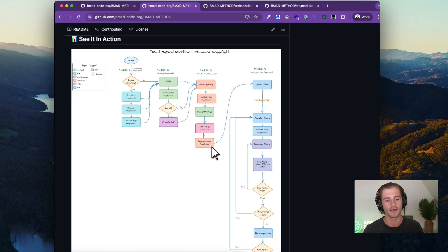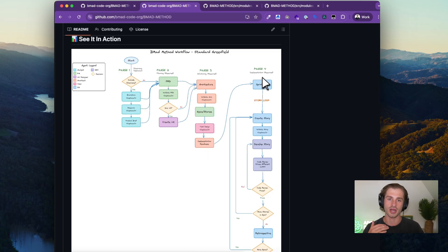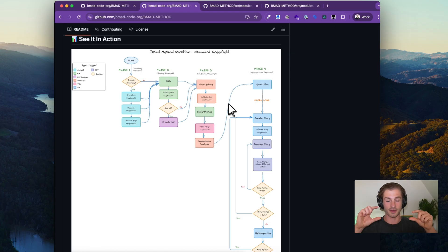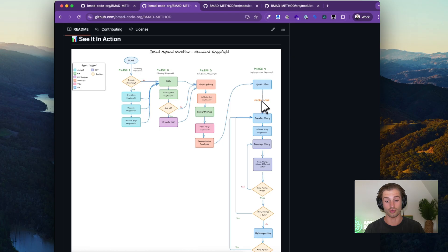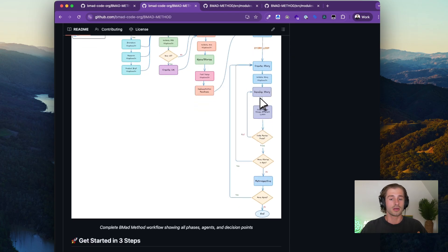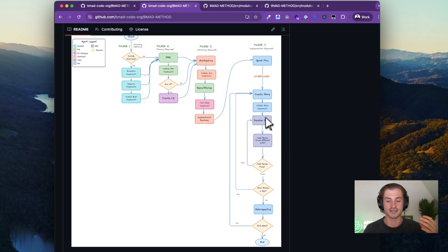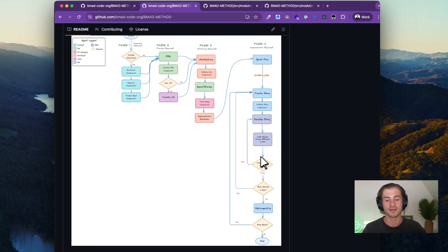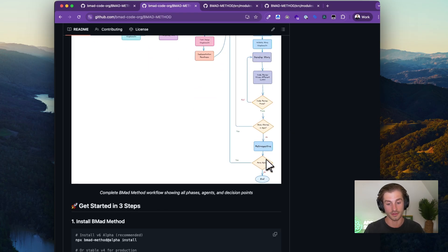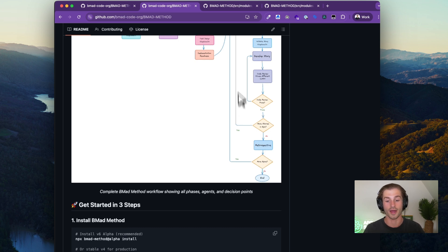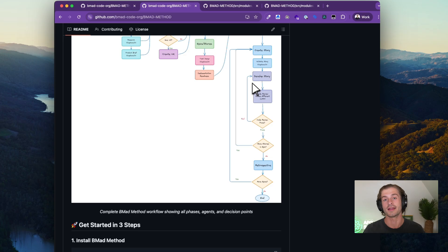Phase three also includes test design and implementation readiness. Then phase four is the actual dev process, which is a cycle. You've got your list of epics and stories within each epic. For each story, you run a story loop: use your scrum master to create and validate the story, the dev agent develops it, you QA or code-review it, then perform a retrospective action — and continue that loop until all stories in an epic are complete and your project is done.